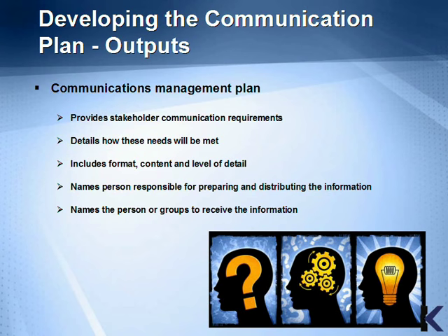The only output from this process is the Communications Management Plan. It has quite a few elements and should address each of the types of communications needed for the project. It should provide stakeholder communication requirements, details on how these needs will be met, includes the format, content, and the level of detail, names the person responsible for preparing and distributing the information, and names the person or groups to